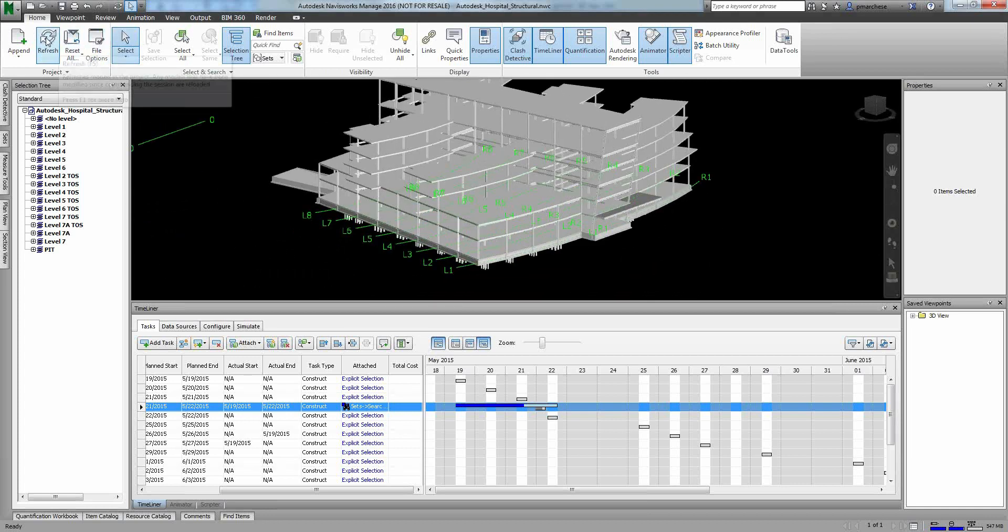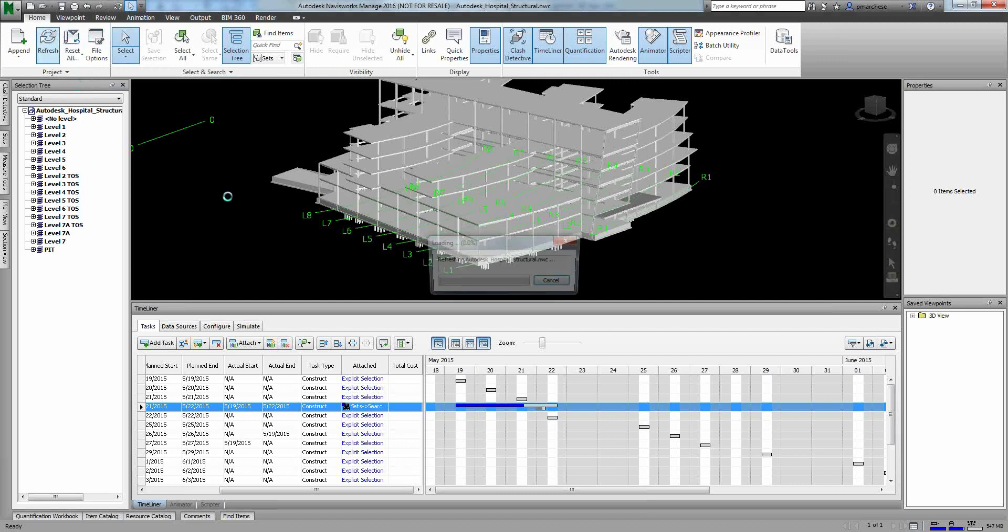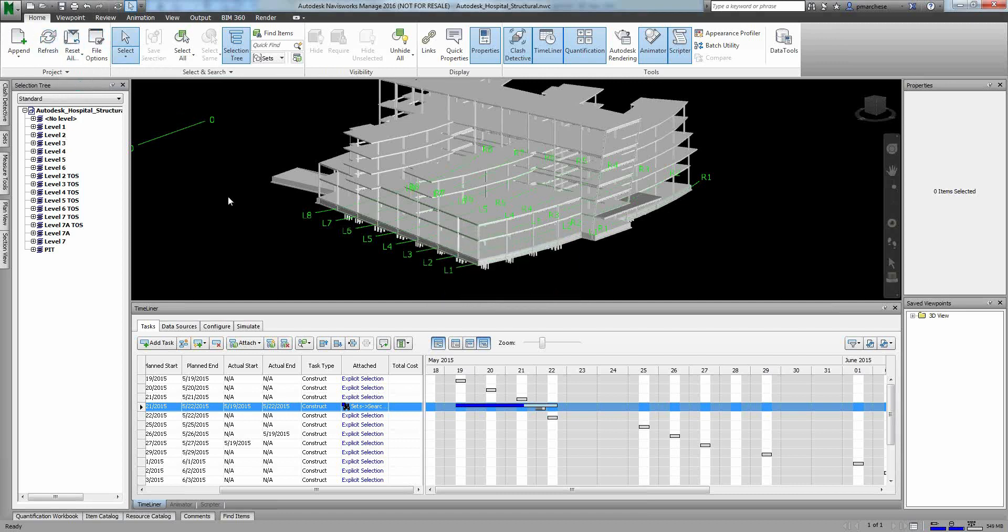So if I say refresh and it reloads my background information, it looks to see if there's any changes in the host file that I'm working with, which could be AutoCAD, MicroStation, Revit, SketchUp, wherever it's coming from, it'll run through that. And I can make the search sets as simple as find me everything on this level or as complicated as I'm only looking for things that are between the third floor and the fifth floor that are mechanical in nature and that are on the hot water system. I can be very, very specific about that. That's one of the main benefits or powers of Navisworks is how detailed you can get and how you look for things.